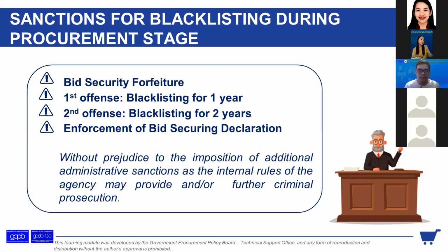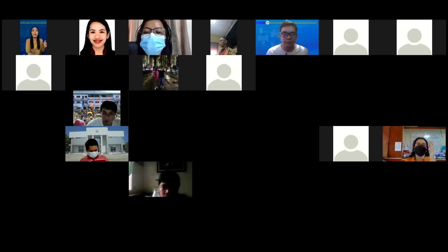Make sure that their bid security, especially, di ba, dapat makaka-cover siya just in case may magaganap during end stage na yung mga award na, before na award, may mga violation siya na pwede i-blacklist, may mapo-forfeit tayo. Baka mawala na tayong mapo-forfeit kasi matagal nang nag-i-expire. So, yan.